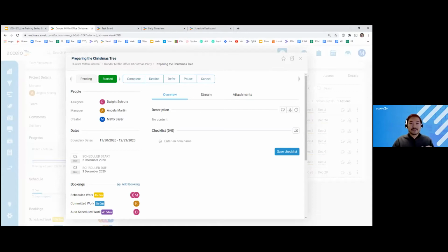The difference between these two dates is the task's estimated duration. Within tasks, you can set an estimated amount of time for how long the task should ideally take the assignee to complete. As an example here, the task can be set to have a duration of 15 working days, but an actual working time of 10 hours.